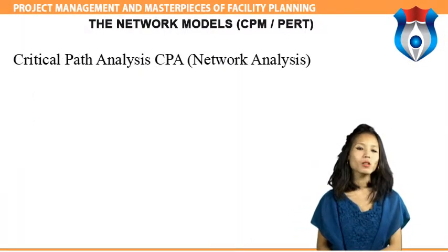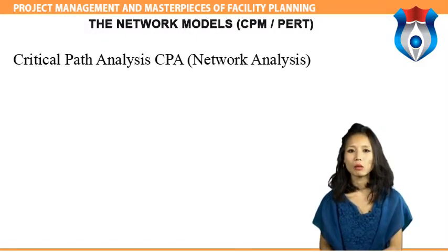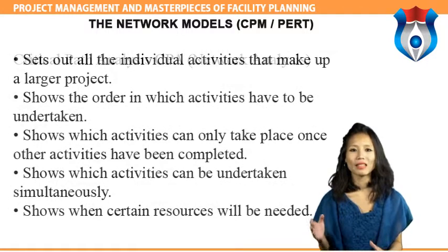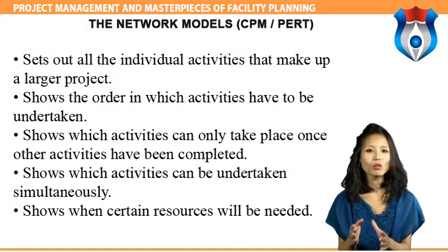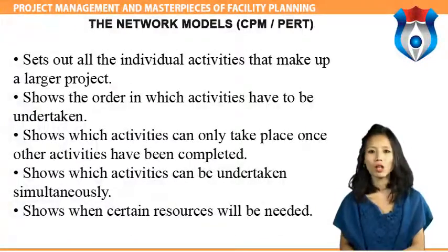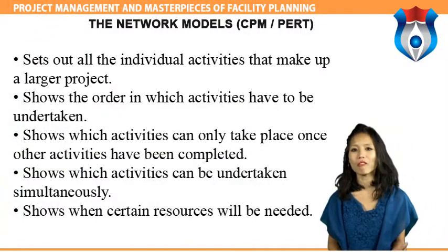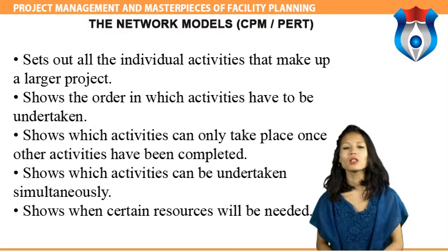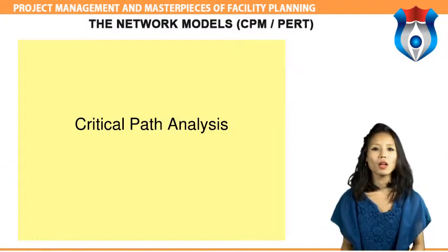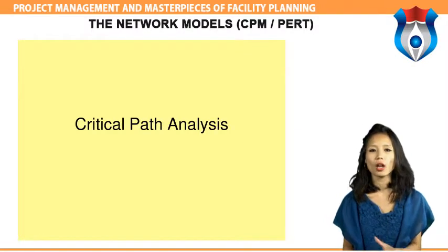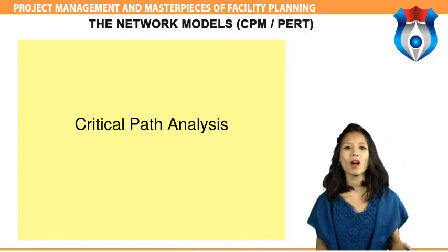Critical path analysis, CPA, network analysis. Critical path analysis, CPA, is a project management tool that sets out all the individual activities that make up a larger project. It shows the order in which activities have to be undertaken, which activities can only take place once other activities have been completed, which activities can be undertaken simultaneously, thereby reducing the overall time taken to complete the whole project, and when certain resources will be needed, for example, a crane to be hired for a building